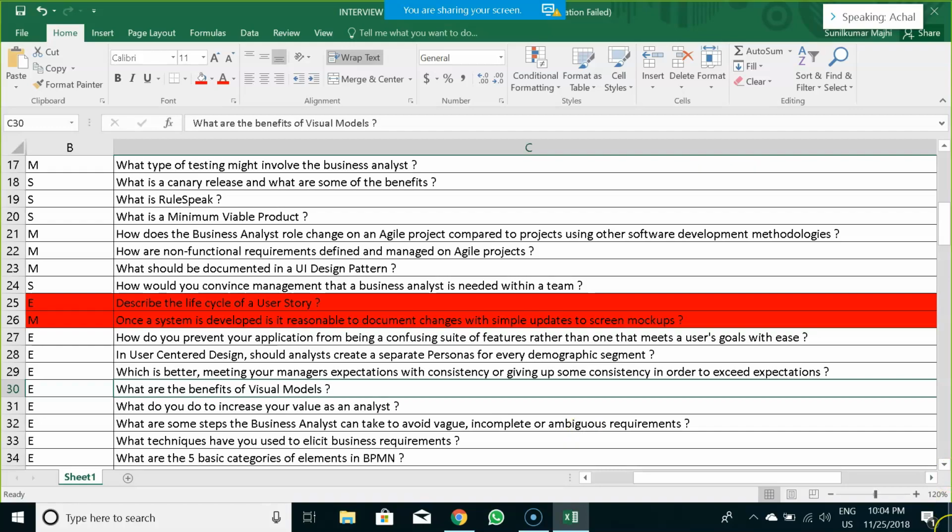The prioritized list creates the product backlog, and we put all the user stories in the product backlog. During the project the team will select an iteration length like a sprint cycle, and also how many user stories can be completed in a sprint cycle. Both of these become determining factors in how to schedule the user stories. During the planning iteration process, the user stories contained in the product backlog are segmented into iterations or sprints. The user stories for the first sprint make up the sprint backlog.